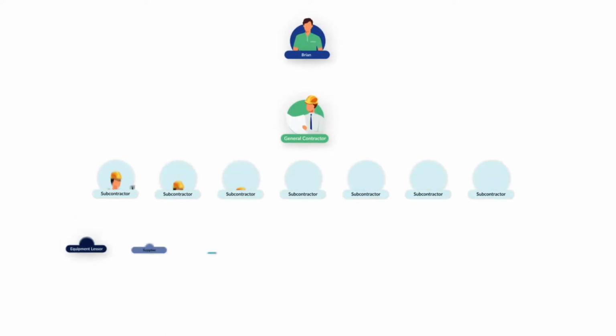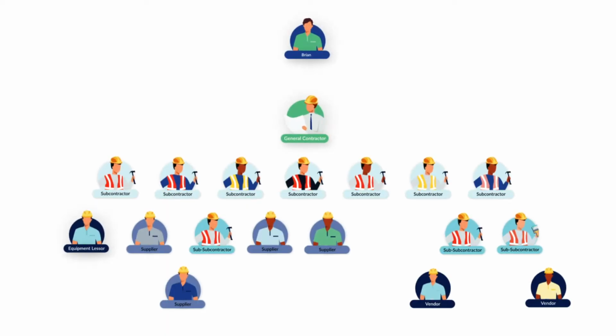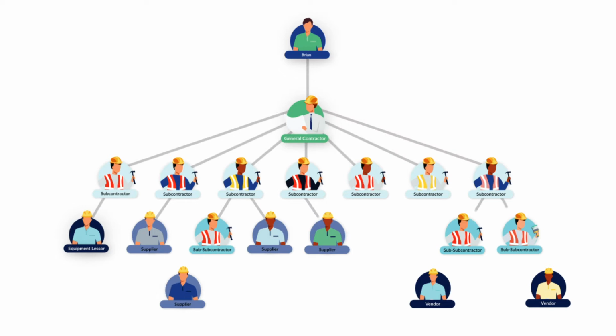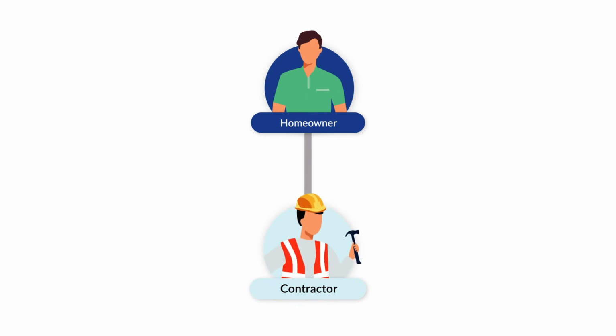In its simplest definition, the pay chain is the structure of all the project stakeholders on a construction project connected by how funds flow from one party to another. For example, a very simple construction project, like painting a house, might have the property owner and a painting company. This simple payment chain shows that the owner, who sits at the top of the chain, will need to eventually pay the painter for the work they do.